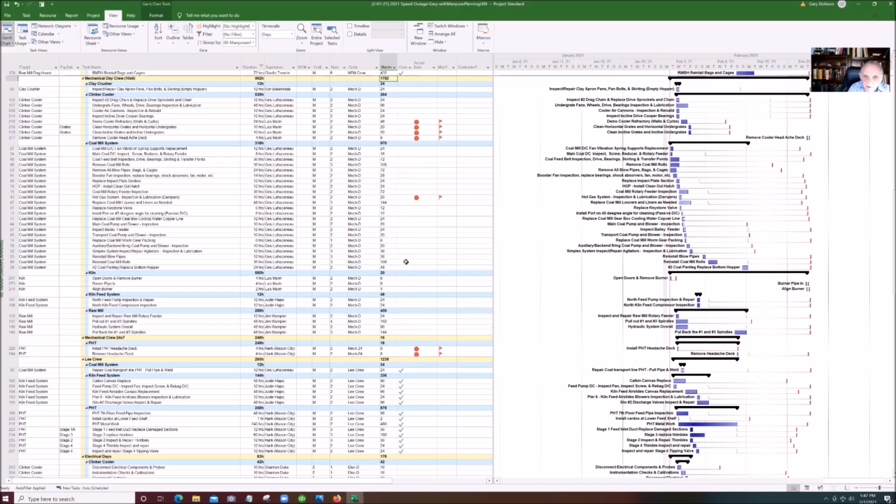So we see we have a total man hours for the day crew of 1,782. So we need to have enough man hours to get all this work done in 3 weeks. And there is absolutely no point in us trying to schedule the time if we don't have enough man hours to do it in the 3 weeks. No matter how we schedule things, we're going to run late and end up in a position where we haven't completed all our work in the time available with the crew we had or the number of mechanics we had.